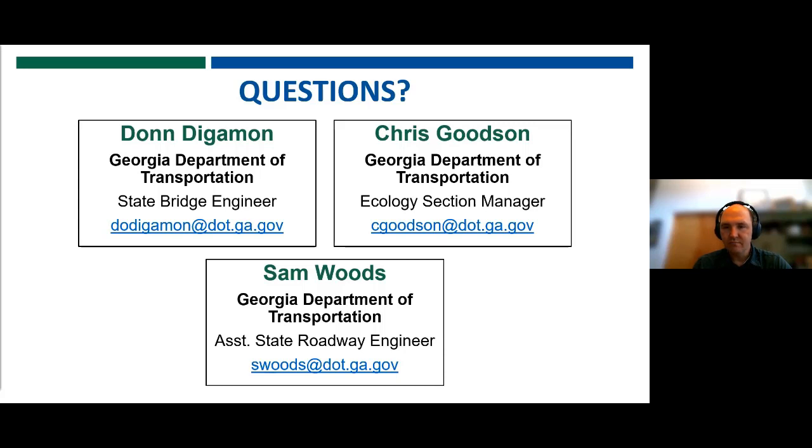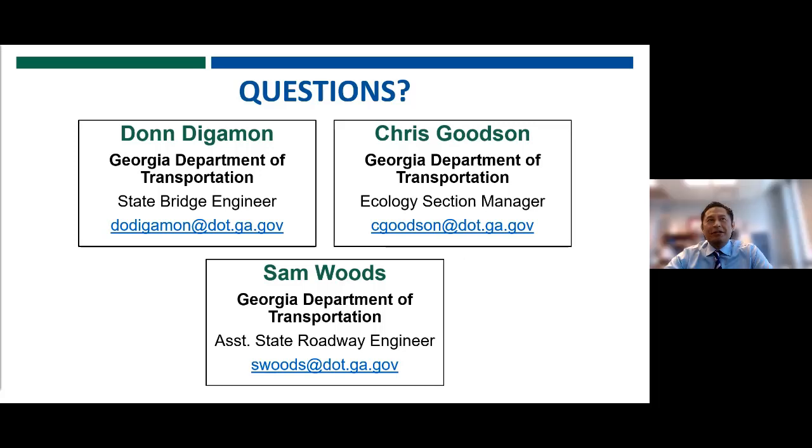We had another question: when should the Section 20 be started for LIBPs, for the low impact bridge program? Since that program's in my office, I'll answer that. LIBPs are a special case. Their schedules are, I would say, short, and a lot of tasks are quick paced. So to that question, if we are going with this new method, for LIBPs there's always a constant that you know what the existing bridge is that's out there. So you start planning how to approach removing that bridge. And to that end, as soon as roadway starts working up their plans, you can start your Section 20 sheet as well.